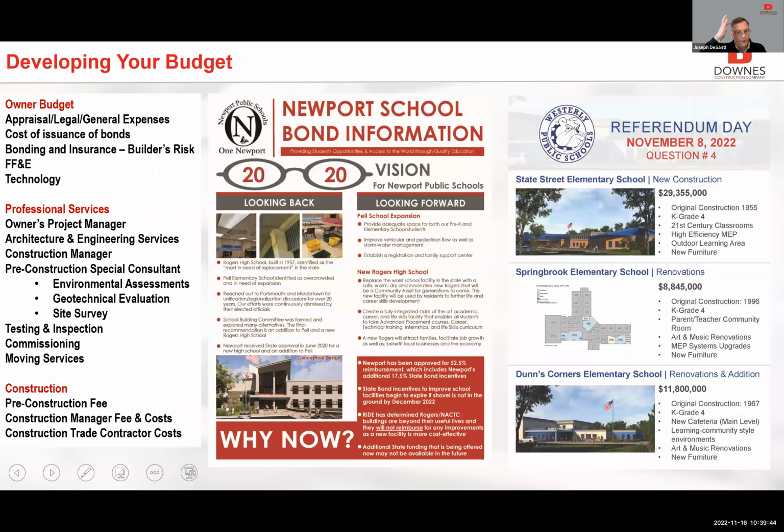Yeah, and Dave, I'll add to that, the answer is absolutely yes, and we're seeing it already. Many of the projects we're working on in Rhode Island need the hurricane grade glazing, Newport, Providence, and we're seeing that already, where there's either a delay or a significant change in what the glazing cost was. Actually, on the Rogers High School, perfect example, in a 1 month period of time, we had a 15% increase on the glazing right after the hurricane. So unfortunately, yes, it will have an impact.